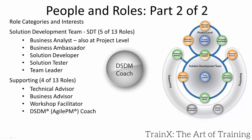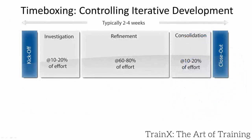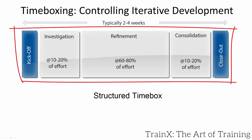A DSDM coach may help with the Agile PM process when the team is not sufficiently experienced. We saw iterative development and its cycle of conversation, thought, action, conversation in the hotel refurbishment example. To control the cycle and make it time-bound — to allow predictability and management — it is common to use structured time boxes. The length of these is typically 20 working days, enough time for development without too long a planning horizon. Our example timings will be for a 20-day duration.